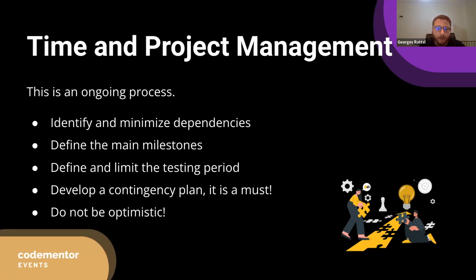But if you don't have the API keys for the gateway or the account details or at least the staging APIs from the client, you won't be able to actually start or test your work. So if you're not aligned with the client and you don't have these details before you start the project, or at least a certain date before starting this specific task, then you're going to end up losing a fair amount of these 6 days, sometimes even more than 6 days, to only get the API keys in order to just start the work.